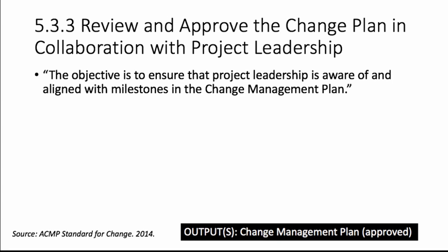Next, we will review and approve the change plan in collaboration with the project leadership. This is to ensure that project leadership is aware of and aligned with milestones in the change management plan. Reviewing and approving the change management plan is necessary to ensure that it is incorporated into the project plan, and that the activities and milestones are coordinated with project activities. Collaboration with project leadership is essential to avoid duplication of effort, align work plans, and increase stakeholder awareness. Inputs include the change management plan, the project plan. Outputs include the approved change management plan.